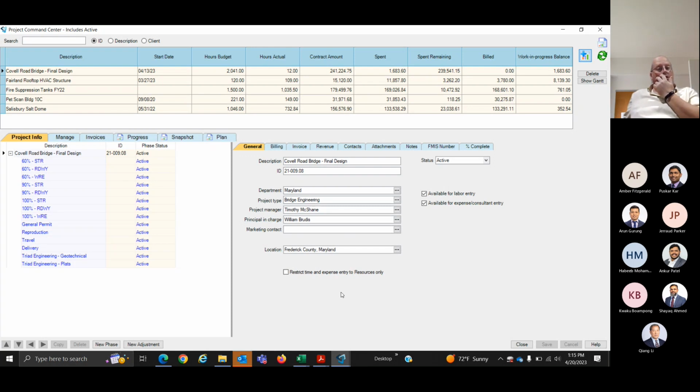They can actually see how many hours they're assigned. I didn't step through that process, but you can look at your schedule and see what you're scheduled for. If you go through and assign somebody 20 hours of work, and Micah, you assign the same person another 20, and Habib assigns the same person another 20, you have 60 hours assigned to the same person for that given week. You'll be able to see that you've got an issue there. The manager in particular will be able to see that, because they'll think, wait a minute, someone's pulling my person.